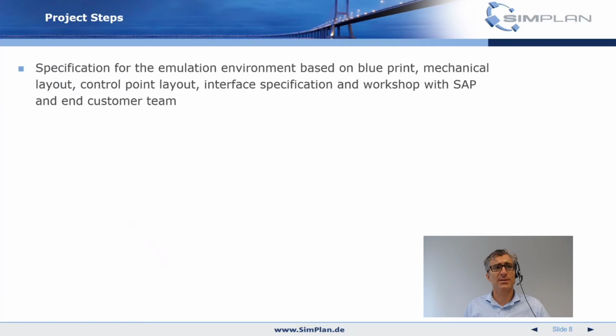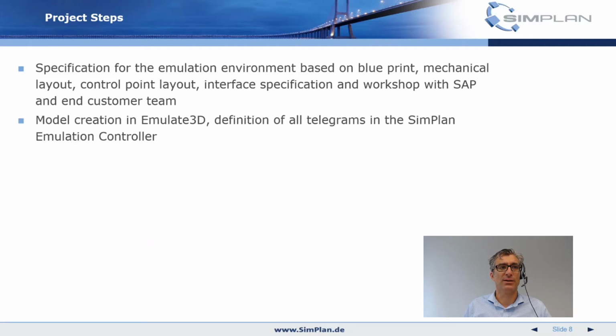So what project steps did we have? It's always a good idea to write a specification. It's based on the SAP blueprint, layout, control point layout, and interface specification. Still, it's a good idea to do a workshop, at least virtually, with your customer and the SAP system integrator team to talk about the projects, the flows, etc.